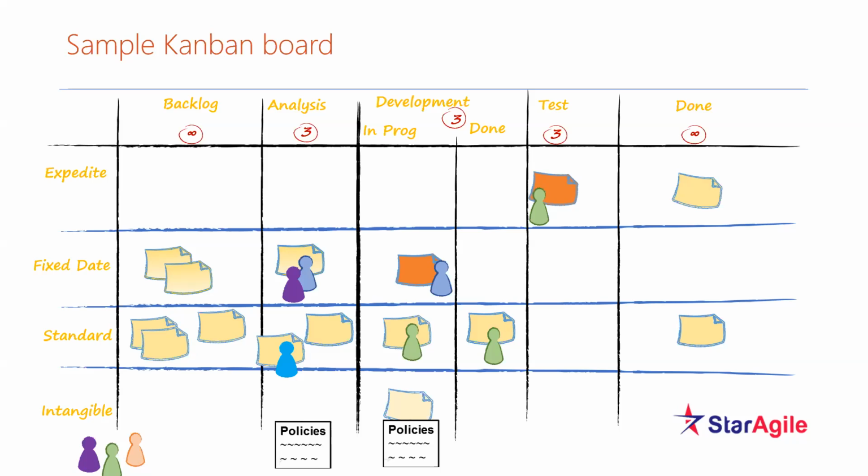So there is no right or wrong formula about it, but again, it evolves. The important thing is it evolves. So let's say I have around 5 members in my team, and let's say I have 5 developers. I can set a WIP of five. I can begin with five, or 5+1 as my WIP limit, so that if there is one thing which is blocked, I can pick the other thing, or 5+2, whatever it is. And based on that, you will start working on the WIP limit.